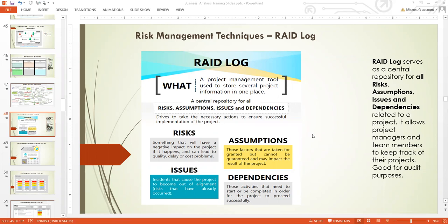You must develop a risk management strategy that you use to address such things, like whether the risk needs to be owned, transferred, or other methods. So whichever strategy you have, you need to address them, and you cannot close it on RAID. So RAID is like a monitor for you. Once you open your RAID, you know how healthy your project is. If it's not healthy, you know that you are in trouble.